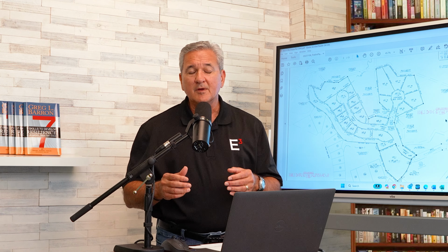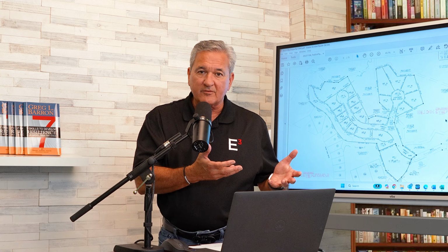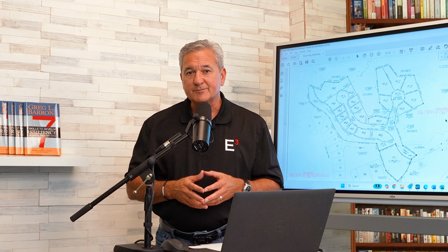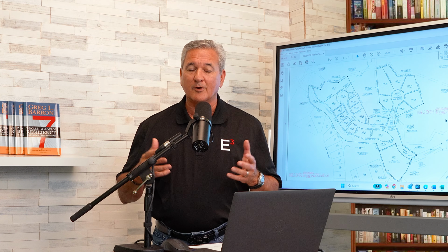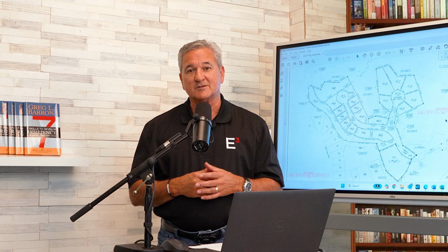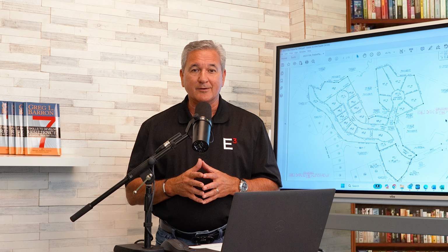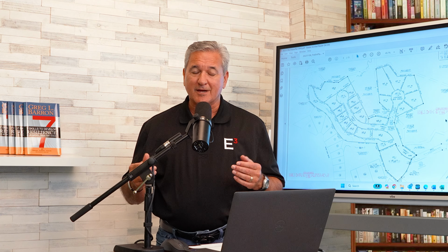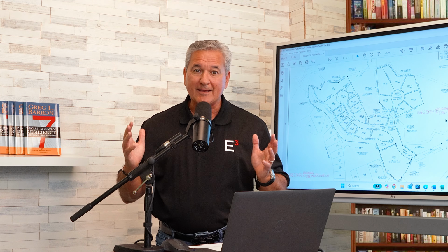And at this time, you have a general idea of what kind of return, if you have investors, that you need to produce. Personally, on my deals, I want to have a minimum equity multiple of 1.4 for investors and about 1.6 to 1.7 for me coming out. My internal rate of return needs to be higher for a landlocked development deal, and many times I want it 25 to 30% or above at a minimum.